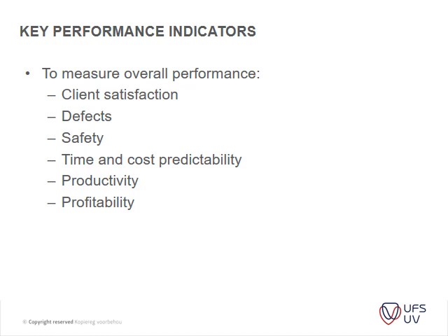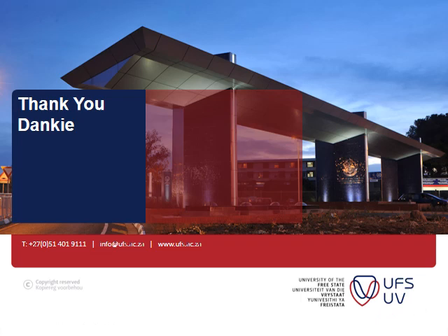Okay, then measure your key performance indicators. To measure your overall performance, you have to look at client satisfaction, which is the one that one usually forgets about, and your defects, your safety, time and predictability, your productivity and your profitability. Okay, so those are your key indicators whether a project has been successful or not.